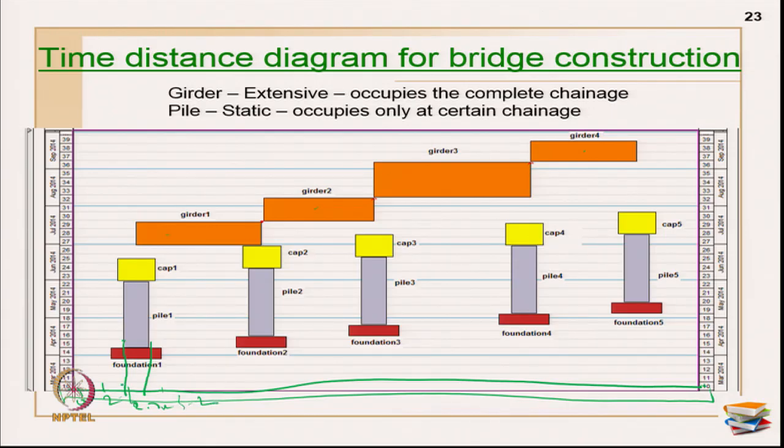So, from this particular distance to this particular distance I am doing my foundation. Foundation is happening from this time to this time, the second foundation is happening from this time to this time and it is happening in the month of April 3rd to 4th week. So, all these you can interpret on seeing the figure only. Okay. So, it is still a visualization diagram and also an analysis tool on repetitive construction projects, that is all about Telos. Okay. So, now we are just wrapping up from the beginning.